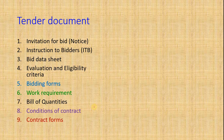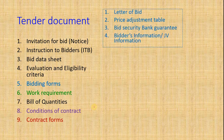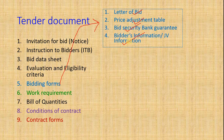Contract Forms and Bidder Forms contain the following four documents: Letter of Bid, Price Adjustment Table, Bid Security Guarantee, and Bidder's Information or JV Information. JV means joint venture — you can apply as an individual or in a joint venture. The number of partners in the joint venture, which can be a maximum of up to three, is mentioned in the Bid Data Sheet.